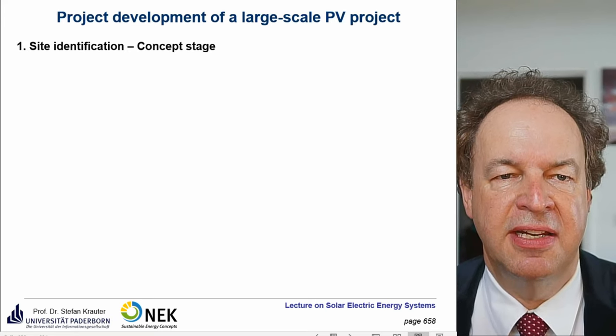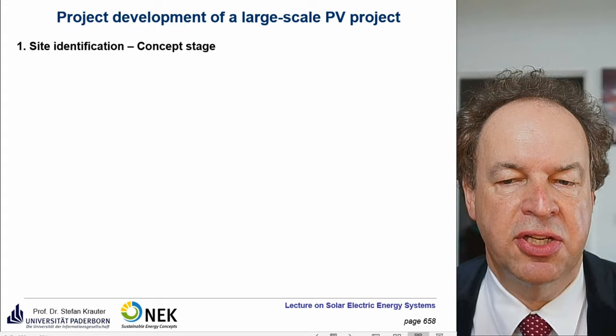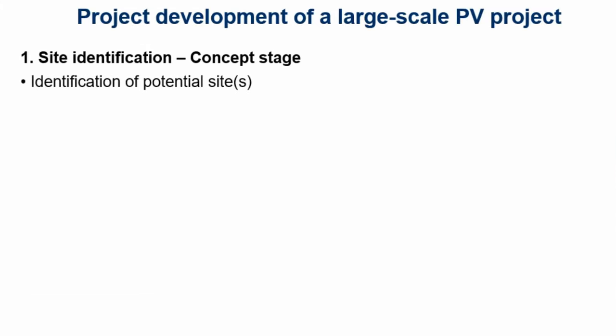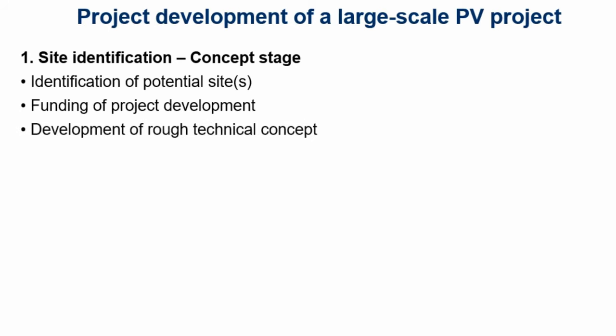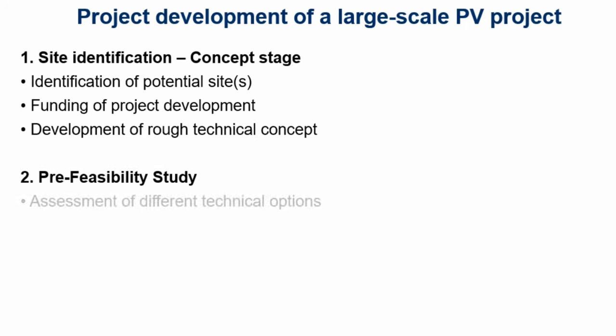Let's start with the site identification — the concept stage. We have the identification of potential sites, because you make a decision later after evaluating different options to find a suited place. Before financing, you have to determine who pays for the project development, since you have to pay engineers and spend time on it. Then you do a rough technical concept — a kind of pre-concept — and then a pre-feasibility study to assess different technical options.